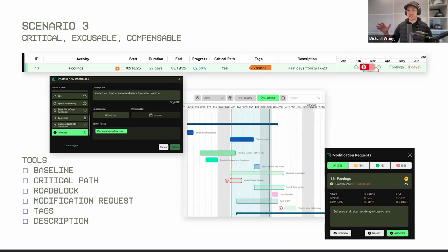If you have a highly detailed master schedule, it makes it much more difficult for them to plan quickly, because you have everything logically tied. It moves everything. It's harder to adjust it to what is creatively being brought up as a plan in the field. You're much better off leveraging that experience in the field, having them drive what you're actually going to be doing. And then if something does pop out the end that you have to capture in the master, you can send that over as a modification request.